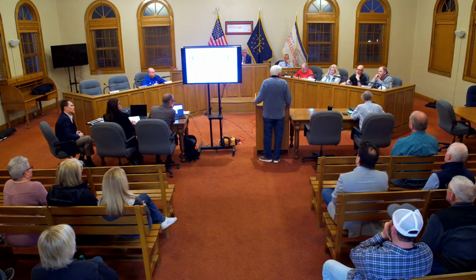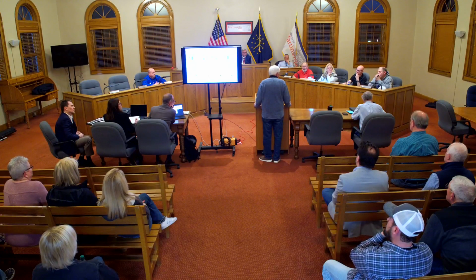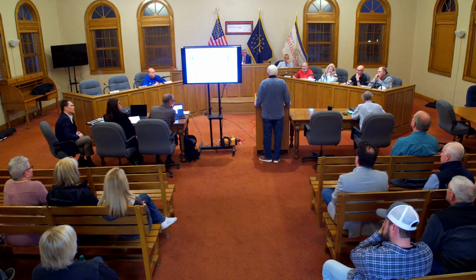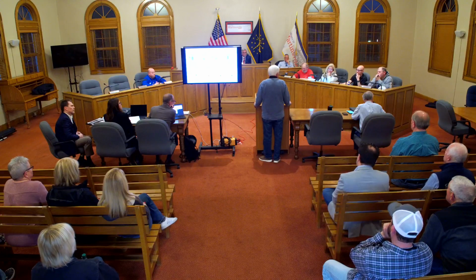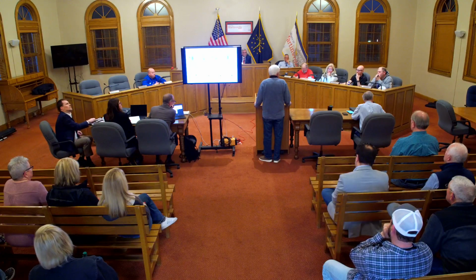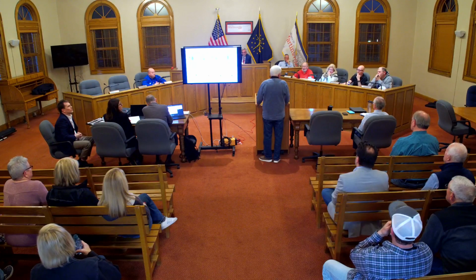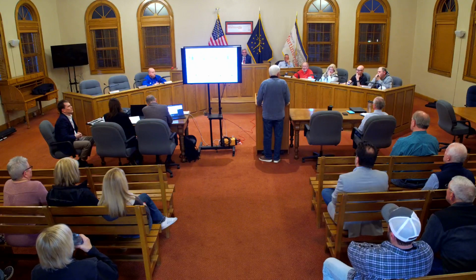I'd spend $1 million on an architect to get design drawings, a full set of specs, to be ready to go out to bid. We don't have to be contained by that, but we then know what we think we're going to build and what you're asking to have done at that point. The BOT process we just did at the police station, we did the set of drawings in advance, not construction drawings, but design development drawings. We were far enough along to get good numbers for that.